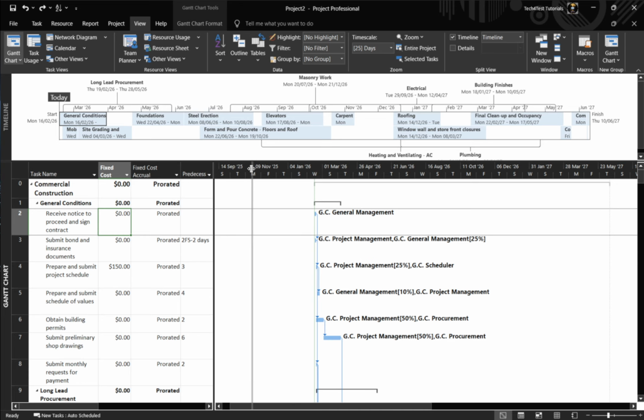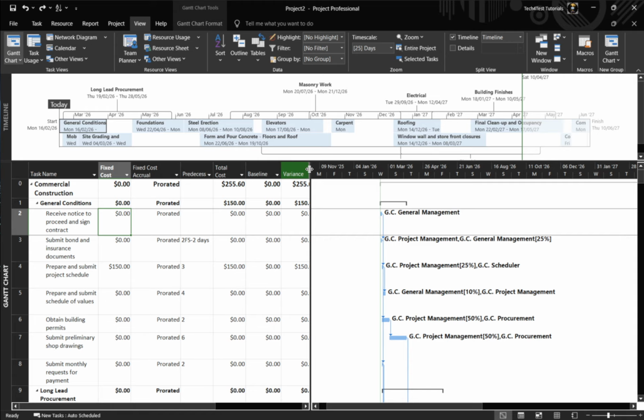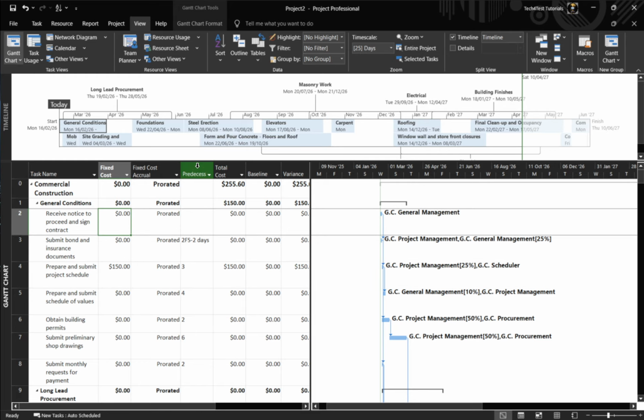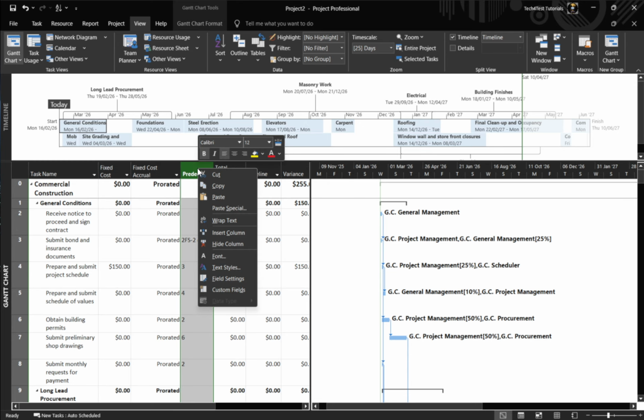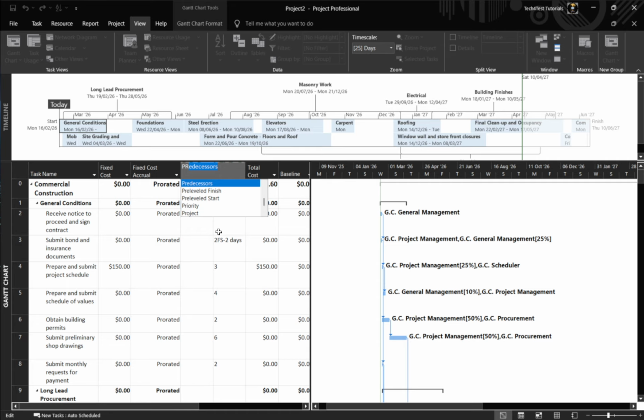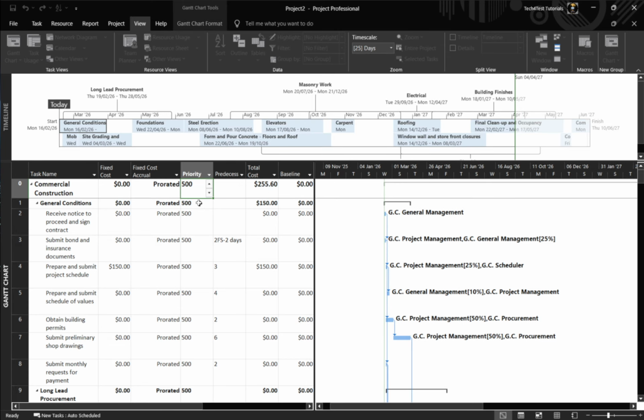Instead, when you level resources to resolve overallocation, Project uses priority, along with slack, dependencies, constraints, and dates, to decide which tasks can be delayed or split. Higher numbers mean the task is more protected. 1000 is effectively do not level, and 500 is the default middle ground. When you're working across multiple projects, each project's own priority also influences which one gets adjusted first during leveling.